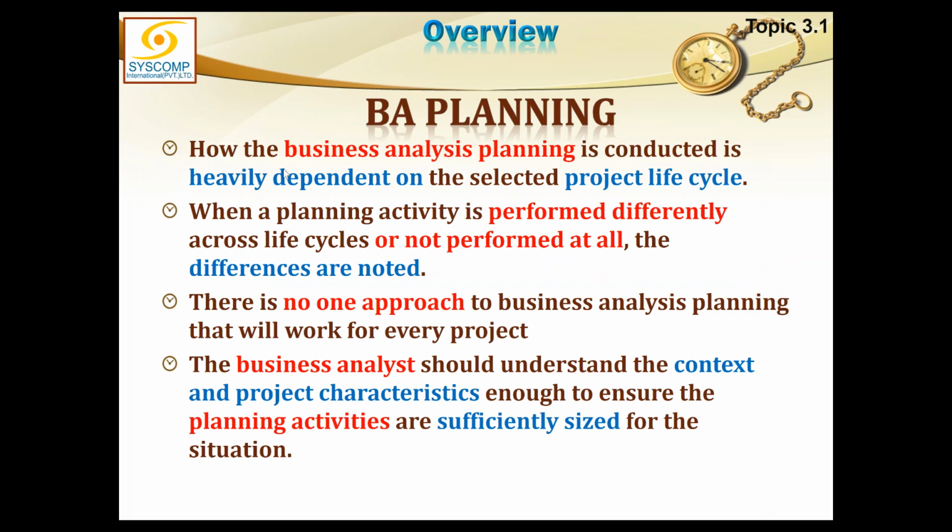Now, business analysis planning, we will see how the business analysis planning is conducted. It is heavily dependent on the selected project life cycle. So if we have already selected a project life cycle, business analysis will be tailored around it, in alignment with the life cycle. If you have a custom designed cycle, then the business analysis process has to know that, understand that and follow that. When a planning activity is performed differently across life cycles or not performed at all, the differences are noted.